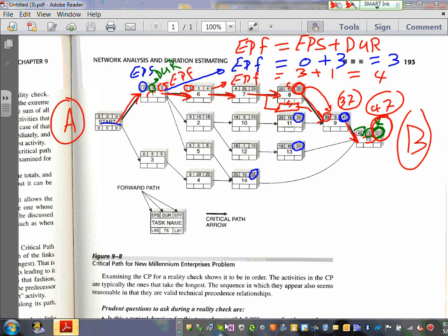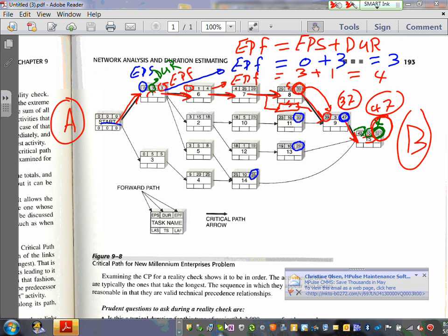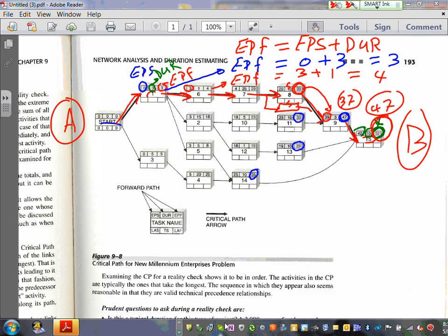This is the path that's going to take the longest, and it will decide the duration of the project. So that's in terms of duration, Adam. Also in terms of dollars, if one path can give you 50% of the project dollar-wise, I pay a lot of attention to this. That can make or break. If another path is 5% dollar-wise of my project, well, maybe I don't give it too much attention. So it will decide, critical, guys. It can make or break your project.